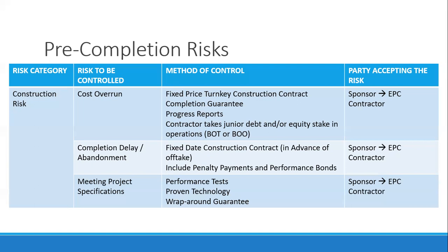To control cost overrun, you contract a fixed-price turnkey construction contract. Because it is fixed price, there is very limited cost overrun risk — you pass that risk to the EPC contractor. You tell the EPC contractor the plant costs 10 billion pesos. If they save money, that's their gain. The risk of cost overrun and the reward of cost savings are both transferred from the sponsor to the EPC contractor.